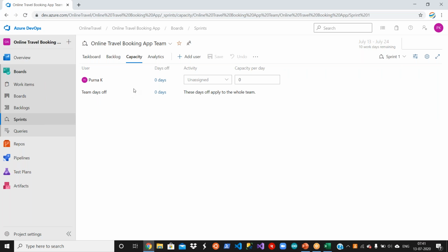Okay, now what I say, Purna, he is an admin. He's 0 days off. He is not taking any off in this sprint. You see the sprint here. This is the sprint 1 capacity plan. And what he can do, he can do the design. And how many hours per day will he work on the design? I would say 4 hours per day he will work on the design. So probably he's a multi-talented guy. He may work on other activities as well.